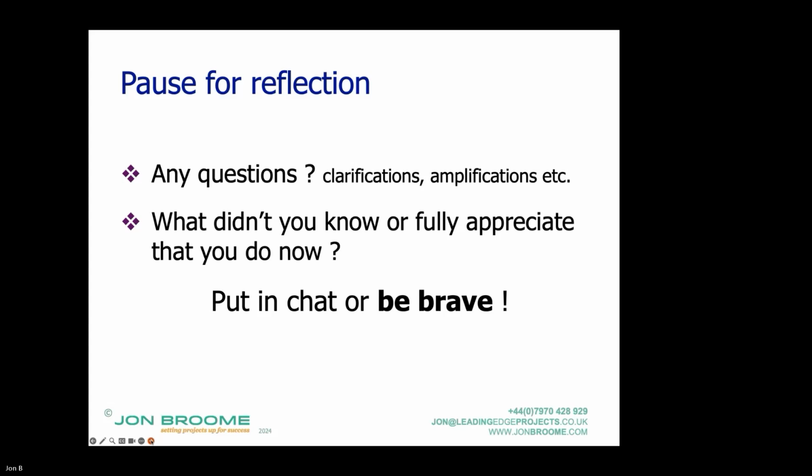Right. Okay. So it really depends on whether it's predictable or not predictable for the contractor. Yeah. And if it's unpredictable, the client pays for it. If it's not, in the unamended contract with clause 60.112, the compensation event for physical conditions is still in there. Okay. All right. Yeah. Thank you.